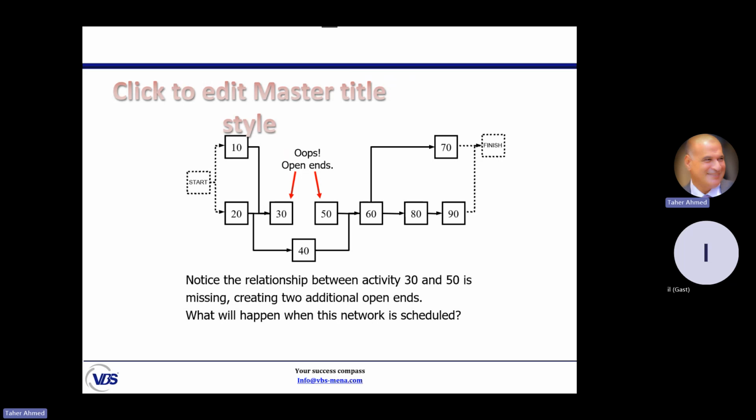Why won't it stop the calculation? Maybe in some cases you need an activity without a relationship. In some cases, in a special project, I don't have to put a successor. It is an end activity. So in some cases, I need this activity like that. So it will give you an error report, and it will complete the calculation, but give you the error report.